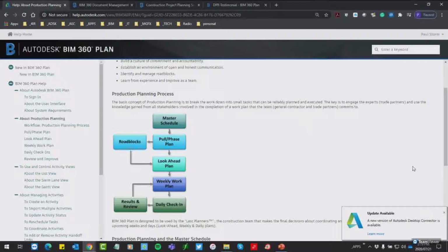That is the project manager level. That goes into the contractor levels and into how to plan the entire thing. So the contractors and the project manager would get together and say, look guys, how are we going to build this building? When do the HVAC guys need to be on site? How long will it take you to be on that floor? When can the electricians come in? Can you give me information? Can we plan this? And that is the master schedule, and then the plan, looking ahead.